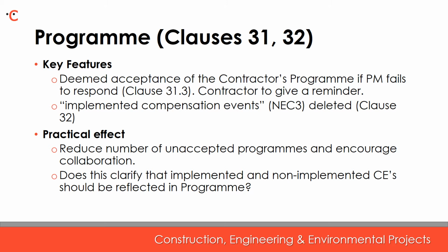And secondly, the requirement in clause 32 to show implemented compensation events in the contractor's revised programme has now been removed from NEC4. This is because there was no specific reference to what should be done in regards to compensation events that had not been implemented, so it was thought better not to cloud the issue.